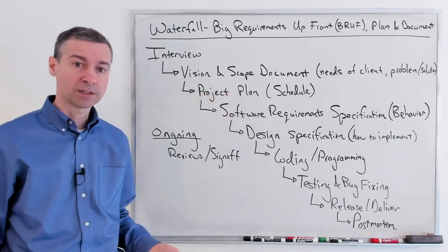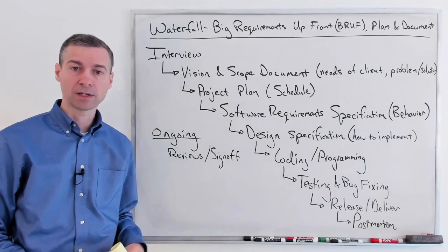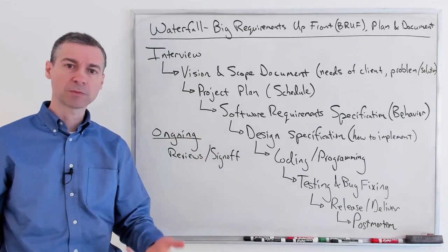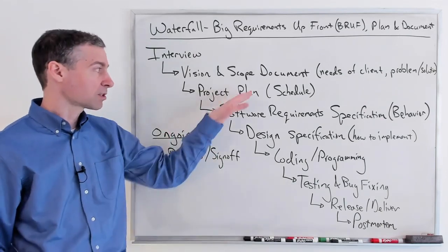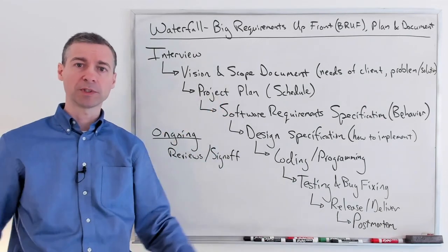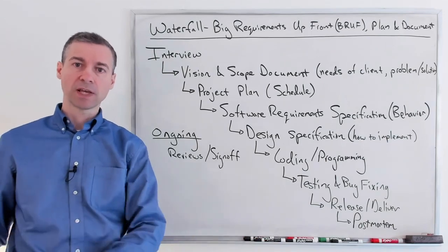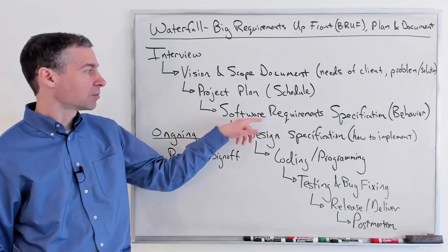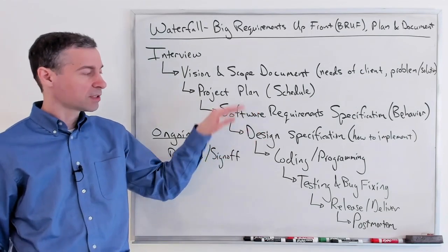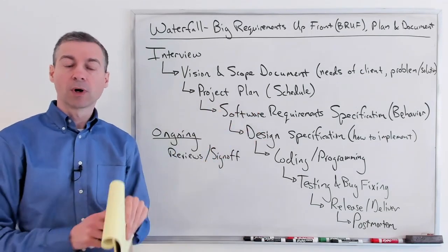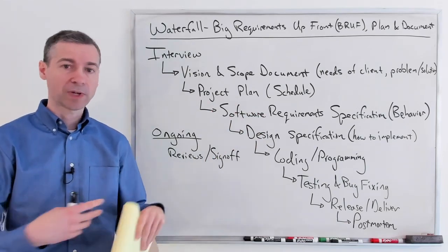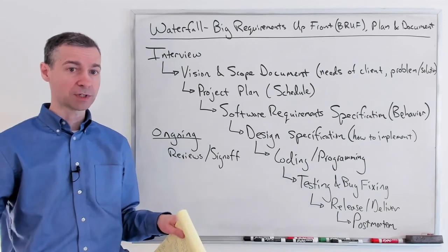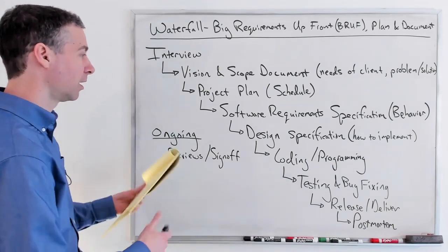You're very likely to have the head of development, the software team, agree, yes, if that's the project plan, we'll be able to deliver and meet those dates that we've put into that project plan. They have to sign off on it. Same thing as we go through each one of these documents: we've produced this document, you've got to review this thing, and you have to agree that this is what we've agreed to, okay?